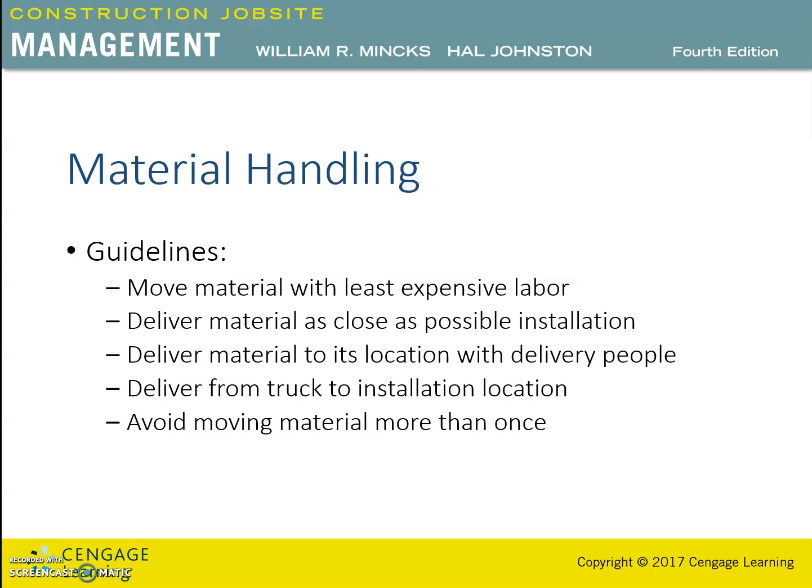Too often on a construction site, a storage pile of material has to be moved to another location because of other storage needs, providing access to work or excavation, or for any other number of reasons. Material piles rarely need to be moved if prior planning is done.